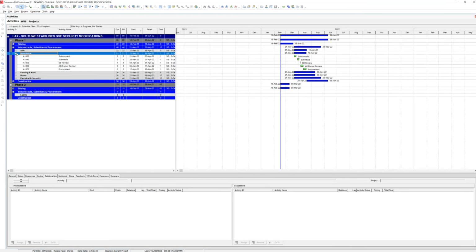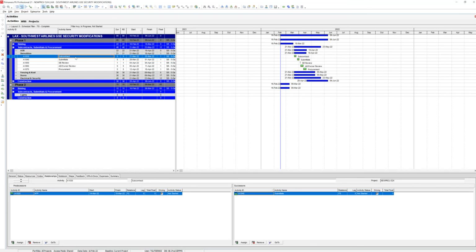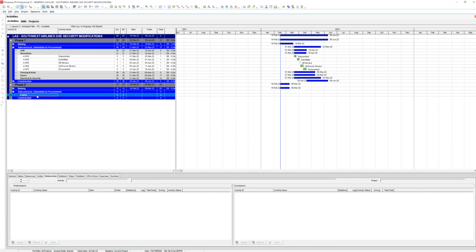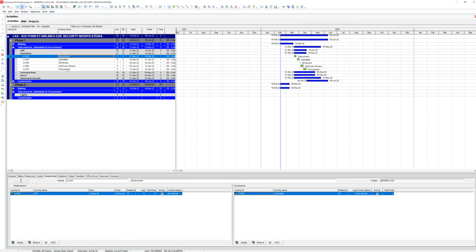And usually the way I track every sub, I do an activity for subcontracting, like the actual contract. Another one for them to do their submittals. We review their submittals. The owner reviews their submittals. And then the time to procure them. So 5 activities within that folder, right? So now that we're in lights, we created a folder. Remember, I can right click and add a new activity, right? But instead of doing that on this one, I'm gonna just grab these since they're already there.